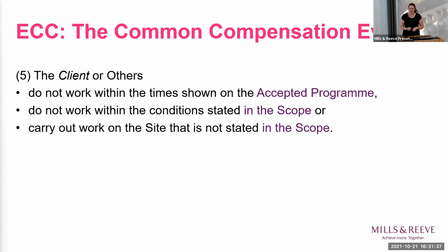The next one is when the work being done by the client or others on the site interrupts the contractor. And this is very much about early management. So you need to be prepared early if you are the client. So you need to be thinking when you are producing your scope, who's going to be on site? How long are they going to need? What conditions are they going to need? And that feeds into the programme.